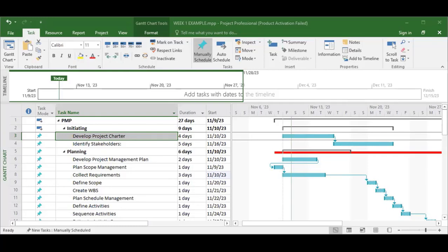For instance, in a building, cost control. How is this managed in the overall concept of project management? One of the ways you do cost control during implementation is you do what we call variance analysis. When you run your reports while your project is going on, you do cost analysis. You see where you are. There are some cost terms when you do earned value analysis. Earned value analysis is one of the tools that we use in project management to control costs.